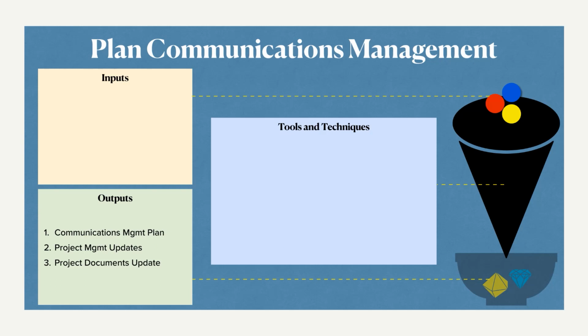Secondly, the project management plan gets updated. For example, a component of this project management plan, like the stakeholder engagement plan, gets updated. Any new process or techniques that we keep adding means the project management plan, the original project management plan, has to get updated. And lastly, the project documents also get updated. Typically, the project schedule and the stakeholder register are the most affected ones, but don't limit yourselves just to these components that I'm referring to.